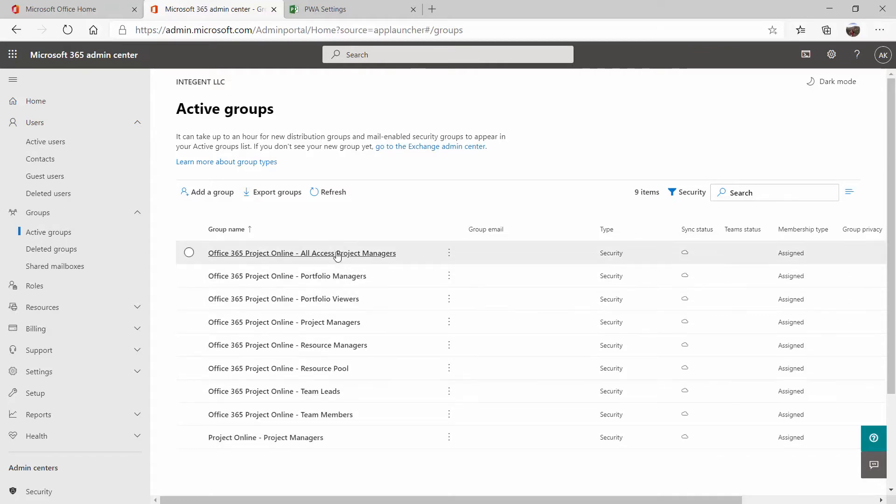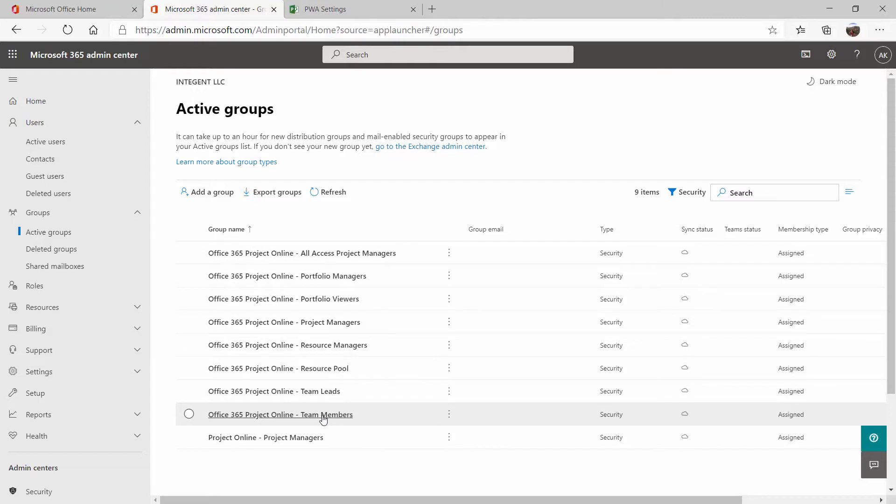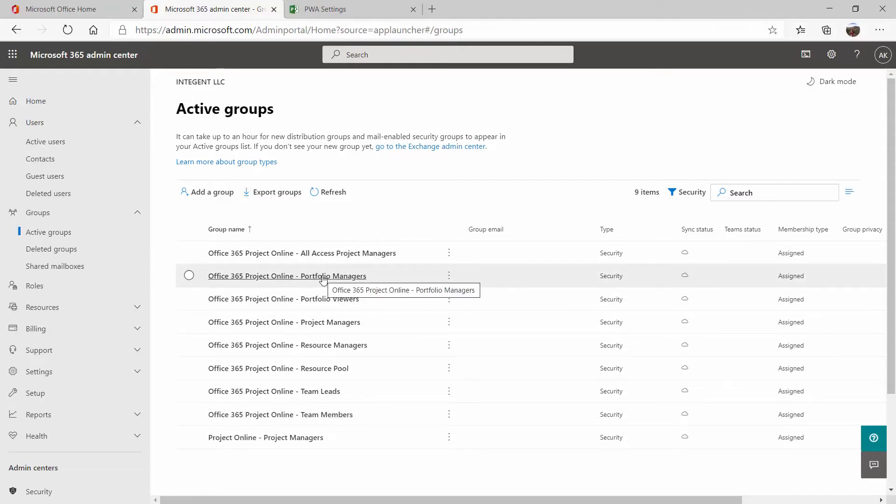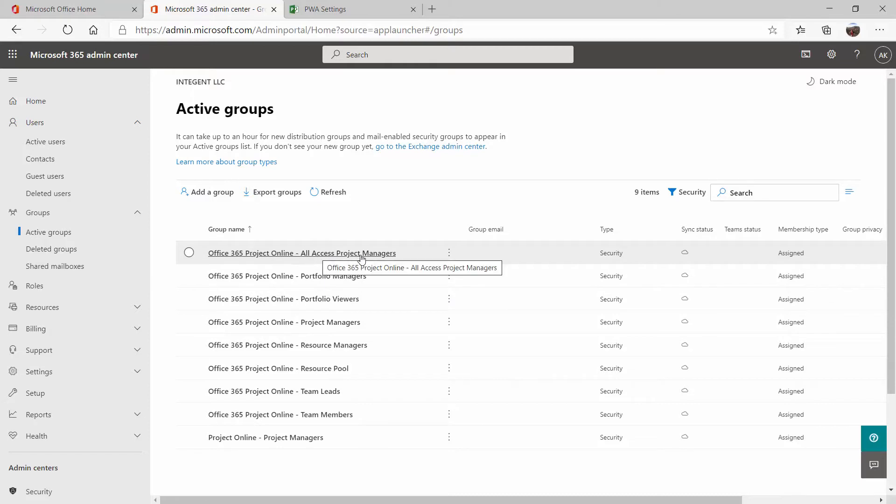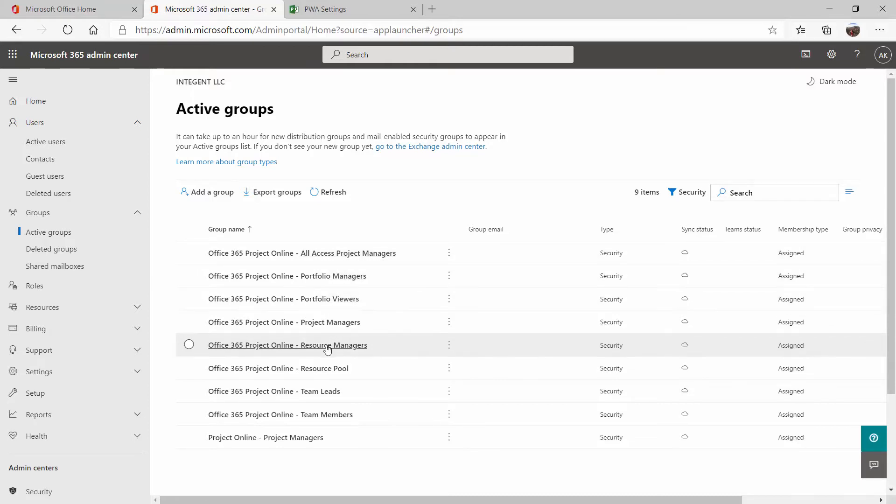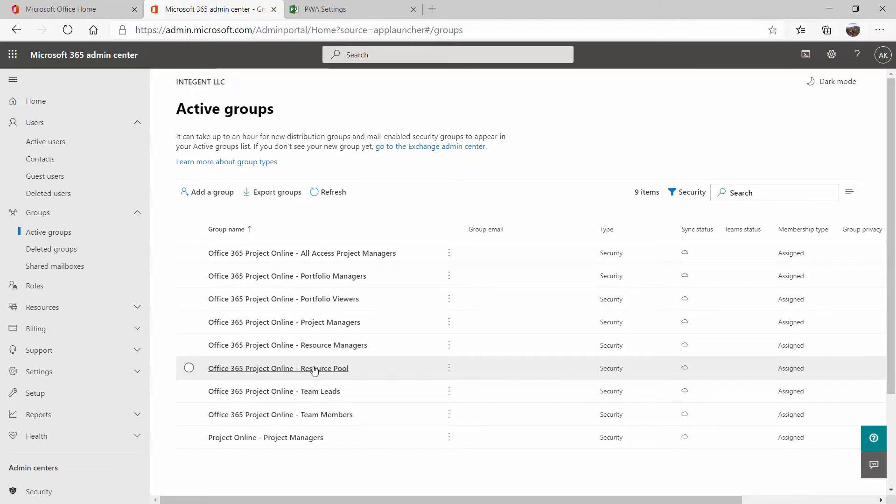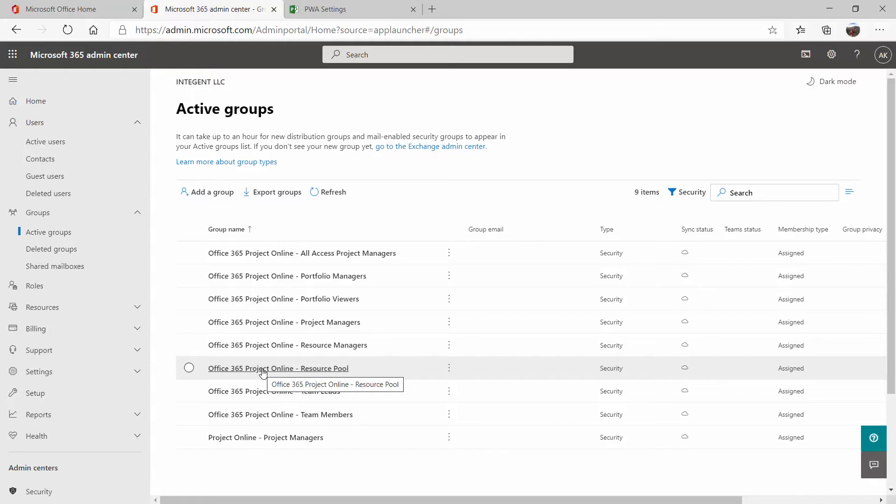So if you look at the different security groups that I already have set up here, you'll see that most of them do have the role that I just showed in Project Online. I have an All Access Project Manager, Portfolio Manager, and so on. The only group that is the exception is this resource pool group right here. This group controls a different part of Project Online, which we'll swap gears over there in just a second, that determines if the resources in this group can be added to projects and tasks as a resource. So if anybody is in this group, I can add them to the task.